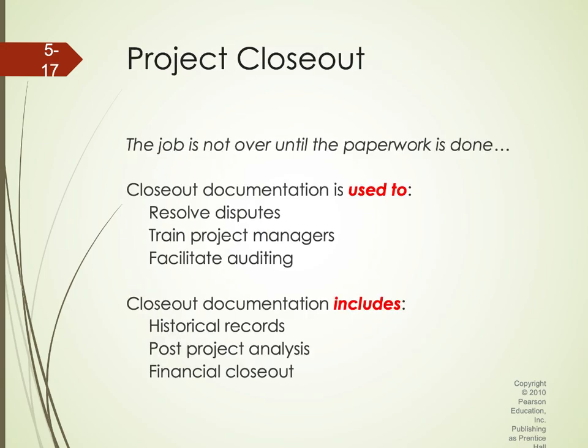Last but not least, we have close out. So once you end the project, you need to produce the paperwork, like your report, which everybody is used to right now. And we have the close out document. It is used to resolve disputes, train project managers, and facilitate auditing, which includes historical record, post-project analysis, and financial closeout.